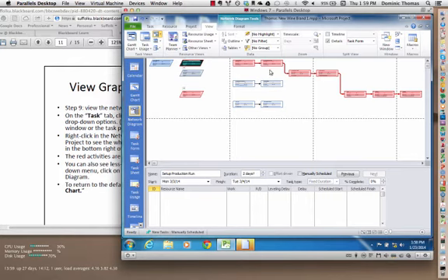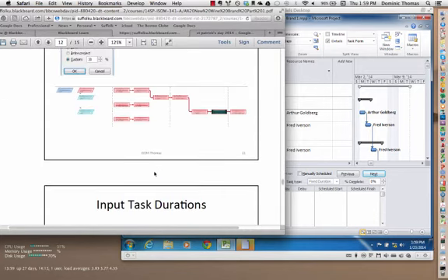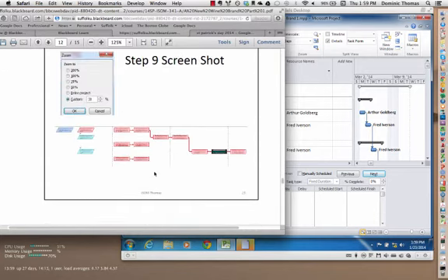It's very linear. I've got 3 sets of tasks that are linear, and no connections between them, apparently. In reality, that's not true. There are connections between them, but for now, that's all I have in my plan. And so I might use that to check and see if something's missing. Maybe I need to add a predecessor relationship. Okay? And that's what we just saw.